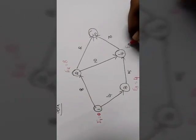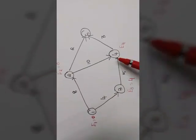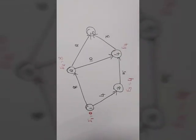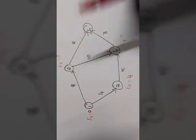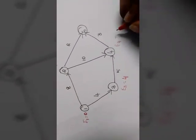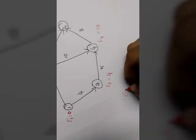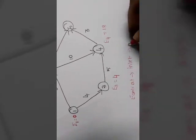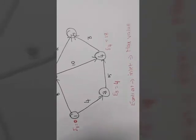Next for E4. E4, in this E4 you will have 2 inlet is there. So for 2 inlet which one is maximization that value will be accounted. So 8 plus 10 is 18 and 4 plus 5 is 9. Maximum is 18. So 18 will be your maximum. For earliest you will have to note your inlet value with maximize value will be taken into account.